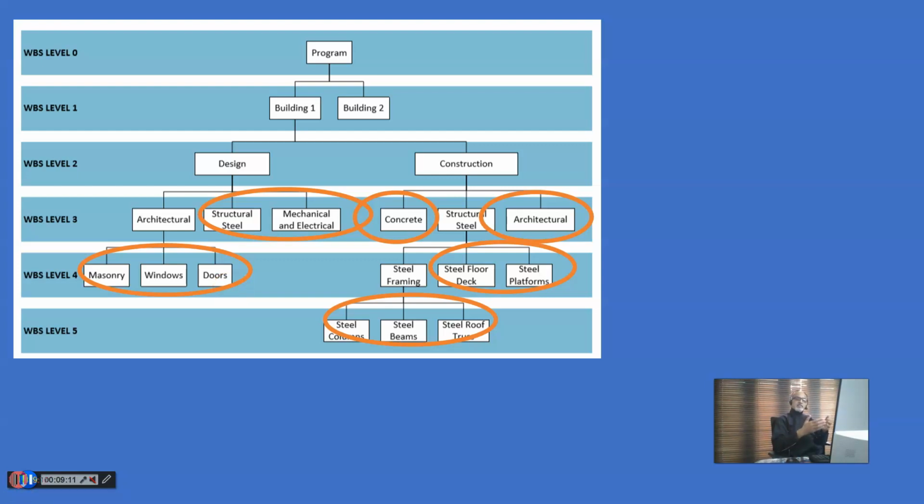And this is very, very important if you want to implement a cost control system, and especially if you want to implement an earned value management system. This is the foundation. That means we need to have the scope defined. Scope must be decomposed into the work breakdown structure and work packages, then estimation of the work packages, then definition of control accounts, and linking of the WBS to the OBS.